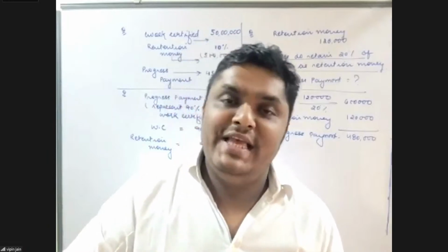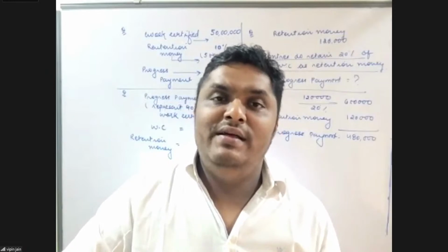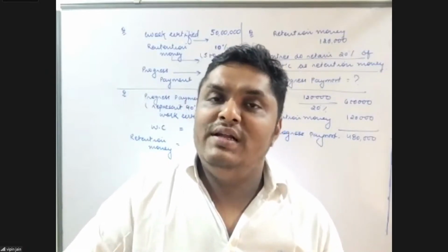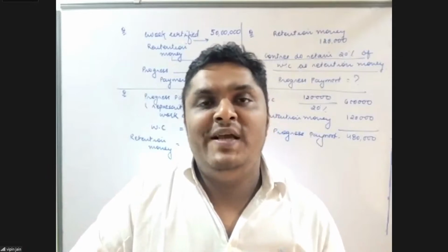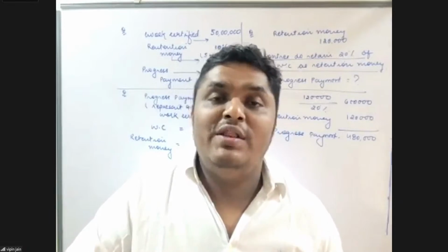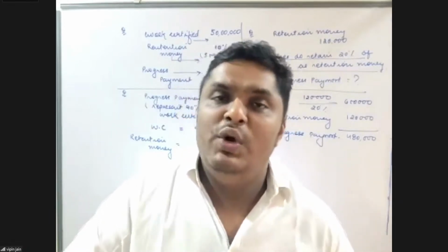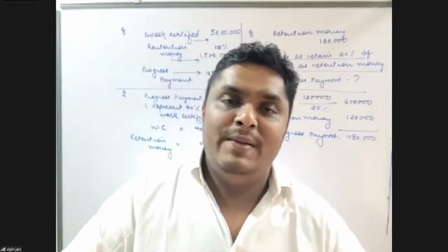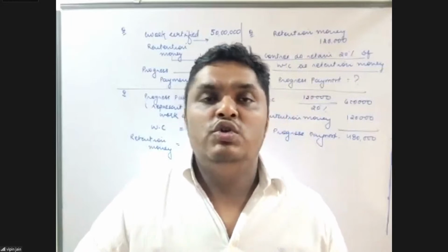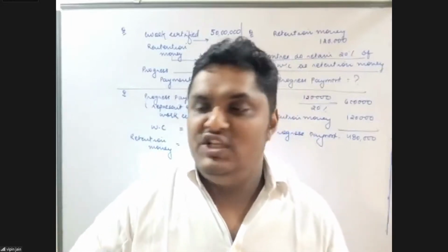Sushil Kumar Barik has explained this: the amount is retained and is released to the contractor after the final survey or inspection, that is, at the time of completion of contract, to make sure that he's using the best quality material. Further, there are no leakages, the bathrooms are in order, and there are no leakages in the taps also. So after the overall survey, they do release the retention money.